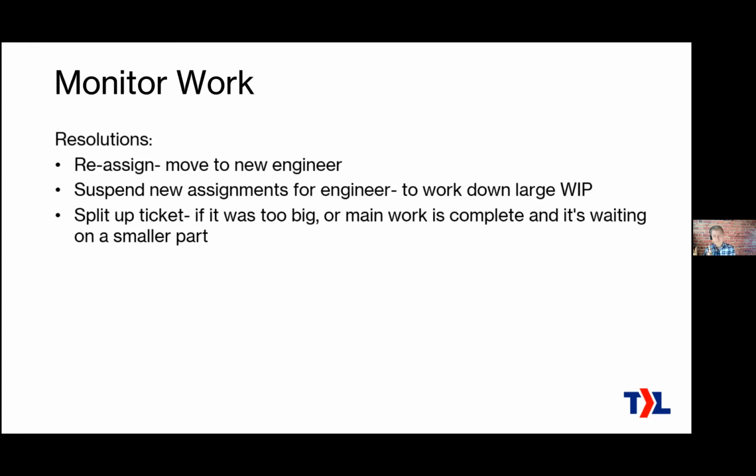So let's put that 20% of work in its own ticket, and then that 80% that is substantially done, well, the 80% is done. We can move that off, say that's complete, and just give the customer this one ticket, which represents the remaining work, and put that back to get assigned later.